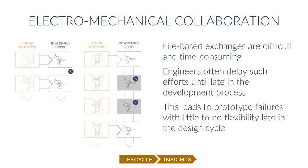If you delay that to the end and you uncover an issue because you haven't been continuously validating or verifying, that can throw a big delay in the overall development schedule, especially the design release cycle. So this is an area where improvement is needed.